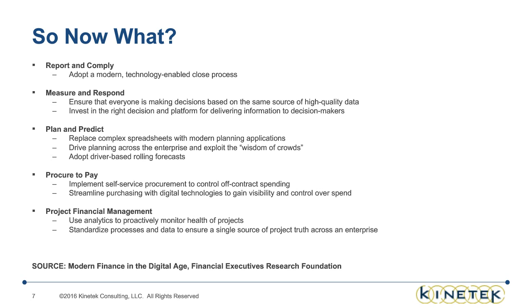And number three, we want to be able to adopt driver-based rolling forecasts. So we don't want to get in a situation where we have to continually, every month, forecast every dollar of cost, but maybe be able to forecast based on certain conditions that are met, which will help facilitate the process. And that takes time. You need to have a historical benchmark for that. You need to know what your business is. You need to know how things are the same and how things are different, so you can apply what you know from the past to predict the future.